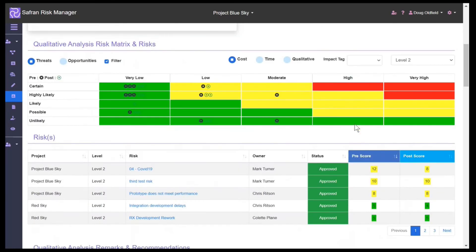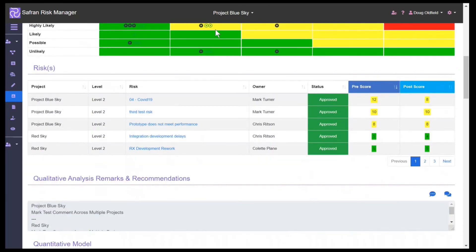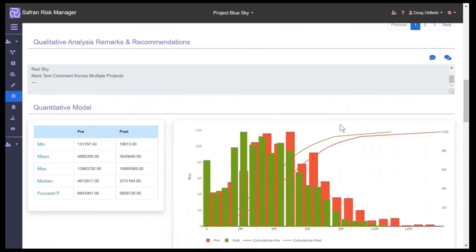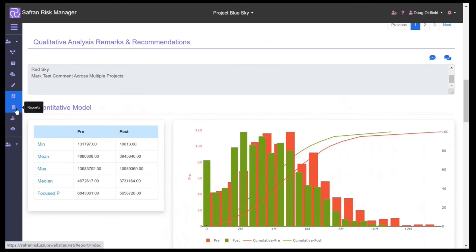Here we can see the top five risks for the view above, and further down we can see the Monte Carlo simulation that is being pulled through into this live real-time dashboard that is being collected as a result of the input of all of our team members putting in their risks and actions on a live basis, compared to Excel where we have issues around different versions. So this is a live database that is being reported on.